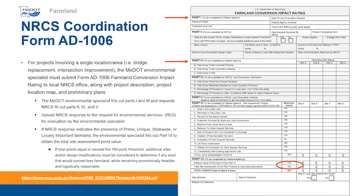When a project requires new right-of-way and/or easements outside a designated urban area, the MoDOT Environmental Specialist must submit form AD-1006, Farmland Conversion Impact Rating, to the local NRCS office. A project description, project location map, and preliminary plans showing the area of conversion must be provided to NRCS. The AD-1006 form can be found at the link on this slide. Detailed instructions for completing each section are provided on page 2 of the AD-1006 form. On the form, the MoDOT Environmental Specialist will fill out parts 1 and 3 and request that NRCS fill out parts 2, 4, and 5.